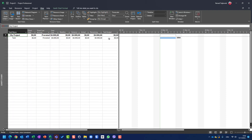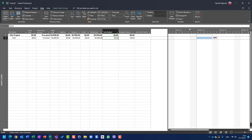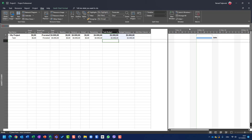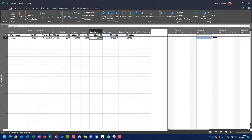The cost is $4,000. What is the budget? The budget is — let's say $3,000. Let me say that I'm 50% done. I'm 50% done, $2,000 is actual, remaining is $2,000, task budget is $3,000, and budget variance is $1,000.